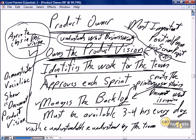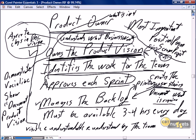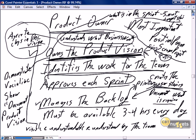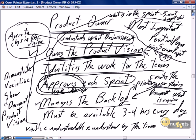The product owner approves the sprint in two ways. First, the approval is what is in the sprint — selecting the five next most important stories and assigning them to the sprint. Second, the product owner works with the team to ensure the stories are appropriately satisfied, then reviews and approves the work, saying: yes, the code written, the documentation created, the processes defined in this sprint absolutely satisfy those five stories. I declare this sprint a success and closed.